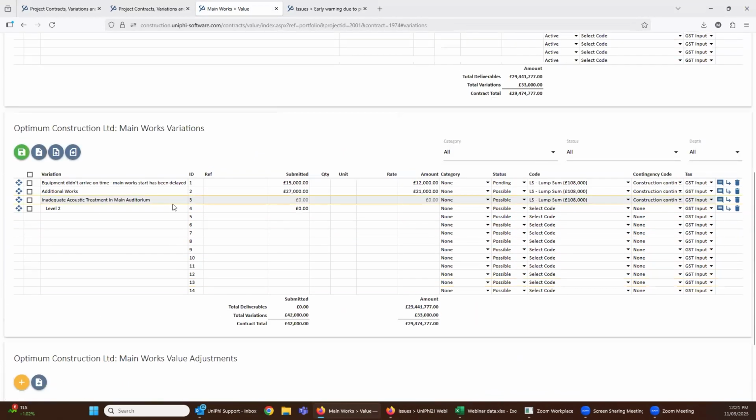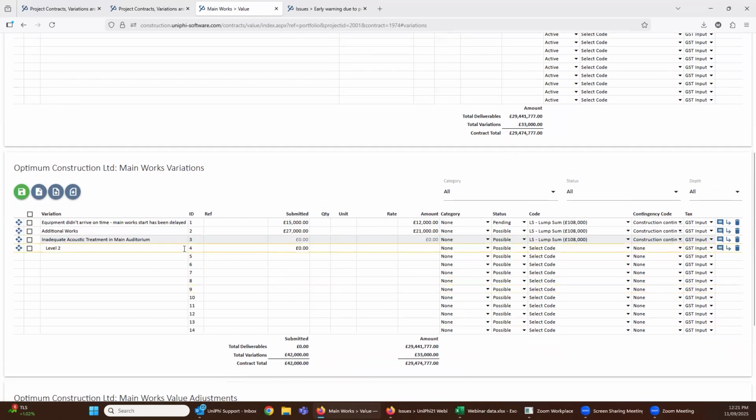The next bit is quite nitty gritty, and it's all to do with managing payment claims. And the way we've sort of updated three things around that actually, around the way we are able to derive how much retention to hold against a claim. And then the second bit being the dates that responses need to be made when issuing the certificate.